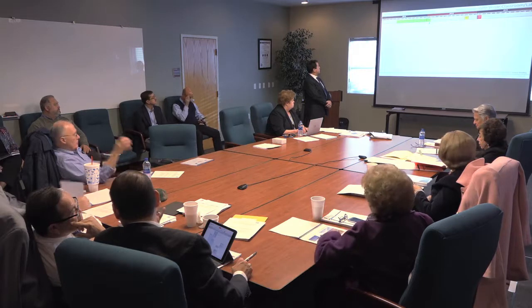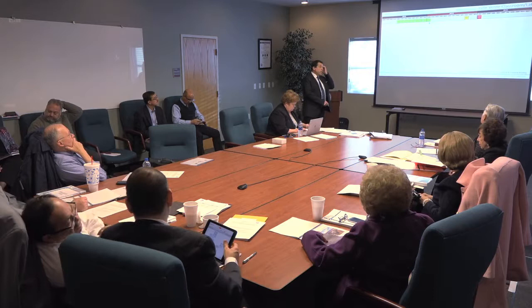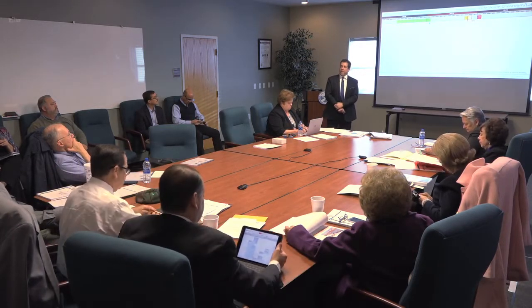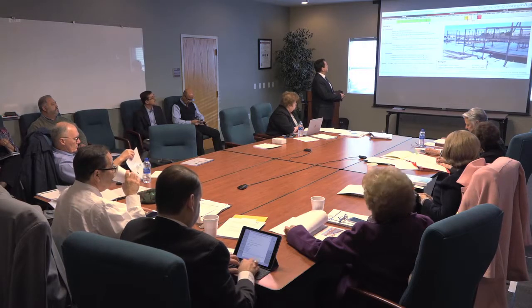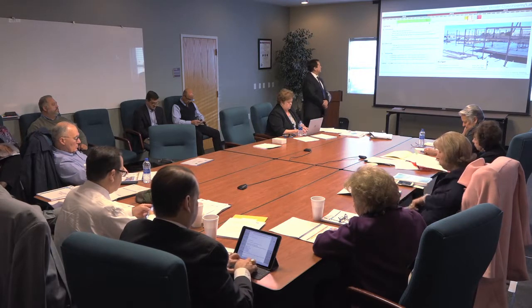So here we are. Nothing has formally changed here. It will change by 22 days, and that's weather days and some coordination days we needed because of the flooding that you recall, the one on the micropilings on the foundation. So that requires some additional coordination. But even so, if we look here, we're still at early November, so our estimate at this point is that it will be perfectly okay with the spring semester.